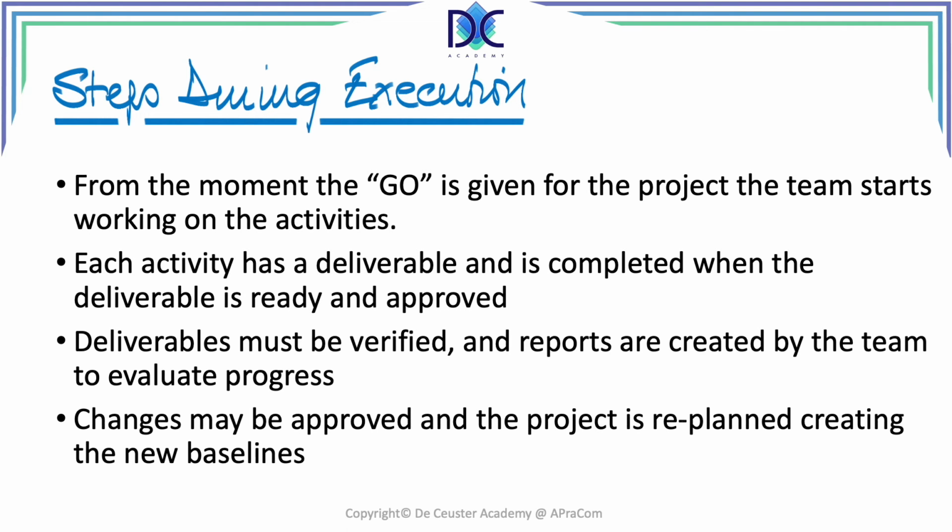During execution, changes may be approved, and in that case, the project is replanned, and we have to create new baselines. Those baselines, from that moment on, will replace the old baselines.